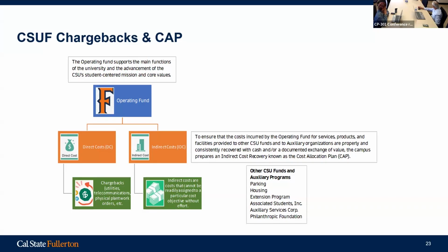I have a question. Yeah. When facilities charge back to a department and they have project management fees within the chargeback itemization, would that be considered an indirect cost? Well, it's an indirect cost, yes, specific to that particular department. As I mentioned before, let's suppose you have a supervisor in charge of 5 trades, the electrician, the plumber, the carpenter, and so on.